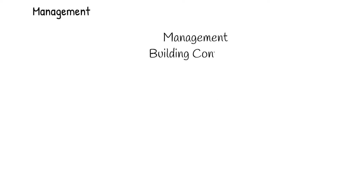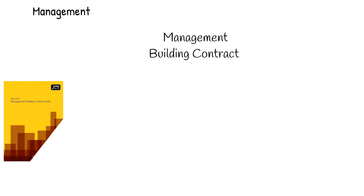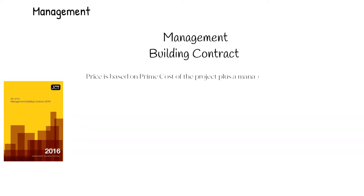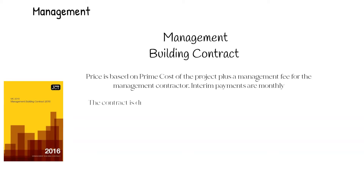Management Building Contract: The price is based on prime cost of the project, plus a management fee for the management contractor. Interim payments are monthly, unless otherwise stated. This contract is divided into two periods: the pre-construction period and the construction period.